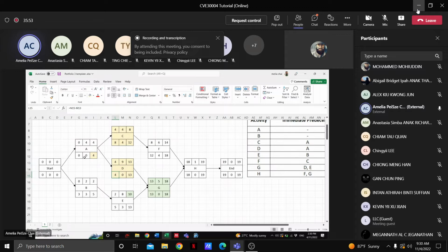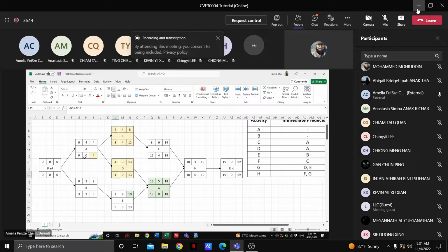So for G, you have to finish off your D and your E. So we have a Gantt chart, for example, this is D, then this is E. Then your G can only start after you have both done, right? So you have a plot here.